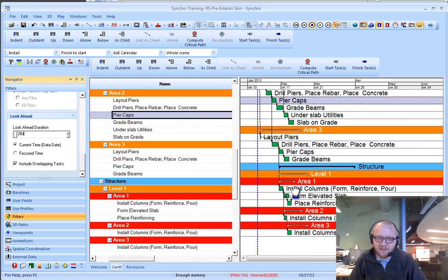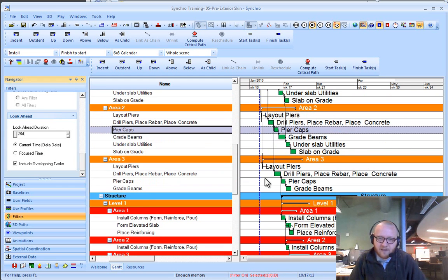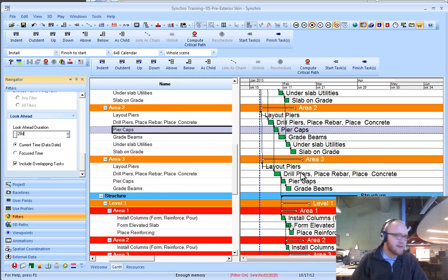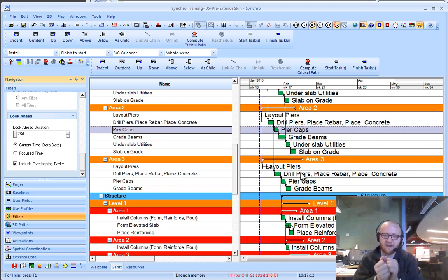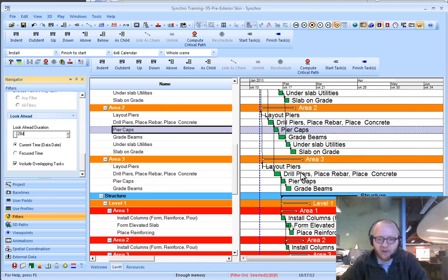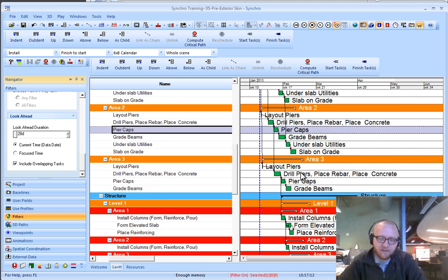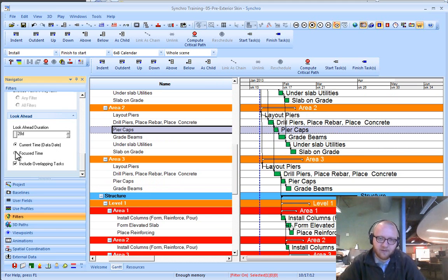What that's going to do is lookahead 28 days from my day-to-date. It takes that chunk and anything that's part of that 28-day period looking ahead is going to be included.